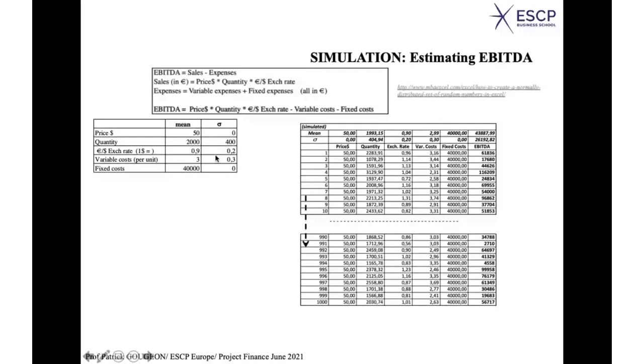When you calculate the mean of these values and the standard deviation, you don't find exactly 2,000 and 400, but close to it: 1993 and 404 here. Would you have, rather than 1,000, something like 10,000 lines, you would be closer and closer to your assumptions.